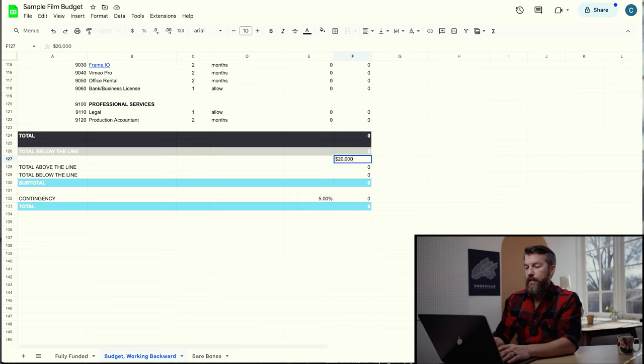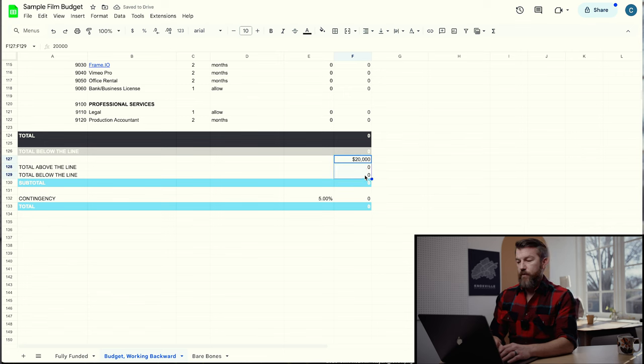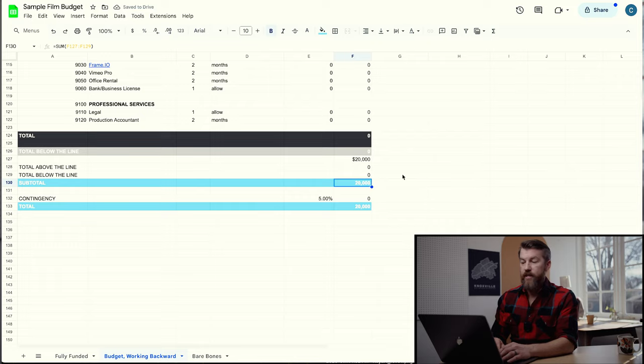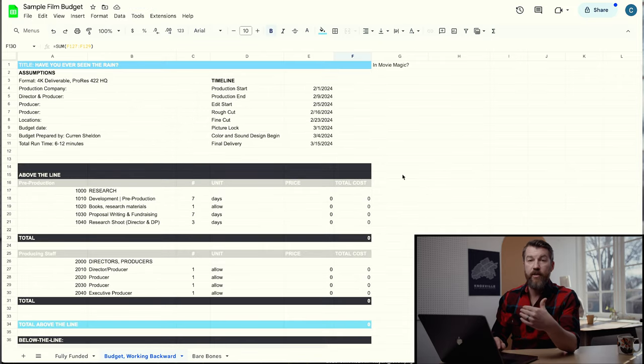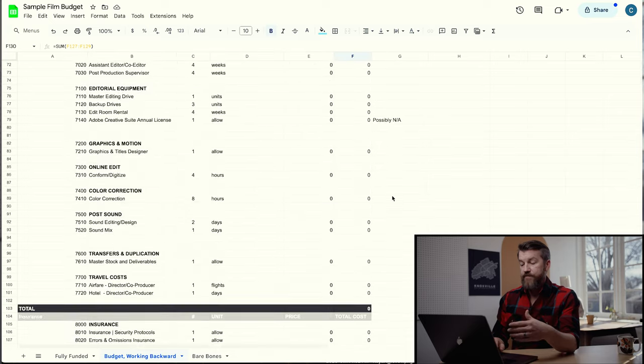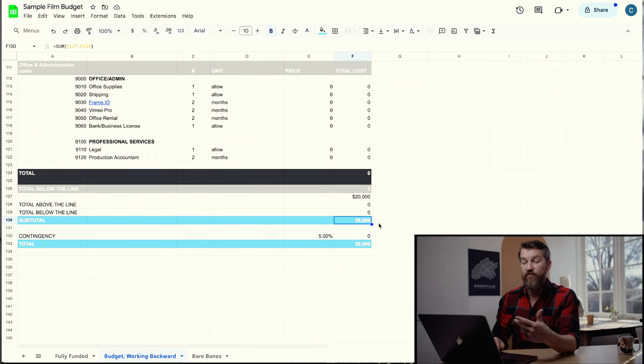Usually what I'll do is actually the opposite — rather than just put all the line items, I'll start with what my budget is and work backwards. I'll put in, say, $20,000 as my budget and start putting in negatives for people I know I have to hire, then see how much I have left over and how many roles I'll take on myself. As I go through and add all the different line items, this will subtract from the subtotal, and whatever remains is basically my profit.